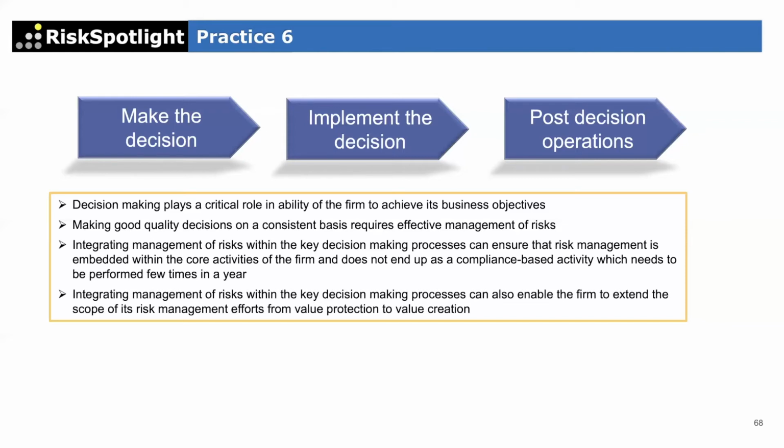And by adding the operational risk element in that template, you're making it part of business as usual. You don't want to just leave them with, oh, please think about risk. No, now it's in that template. So if there are 10 sections in the Word document where they have to create the business case, and section 7 is operational risk, they know they can't submit that to the committee unless they've filled that section adequately, because they know they will get challenged if they don't have adequate information in that section. So that's where we just want it to be embedded.